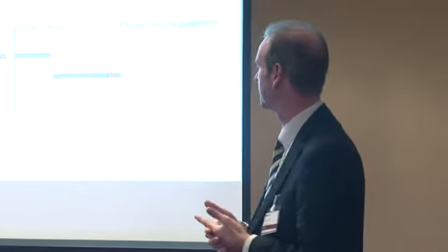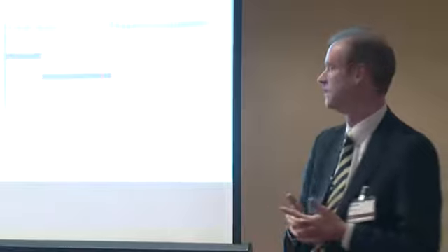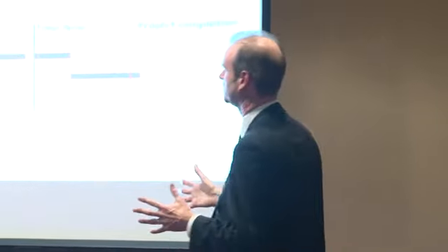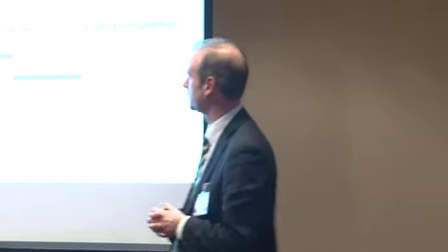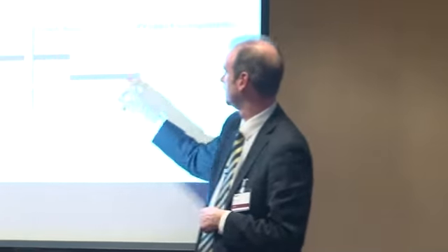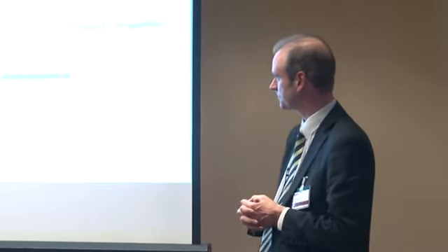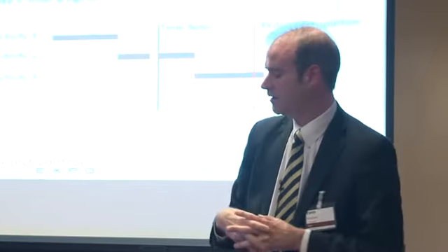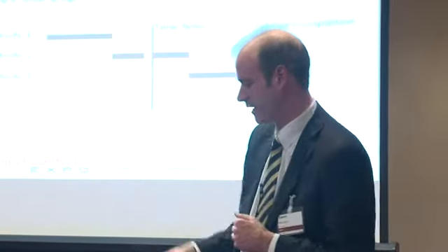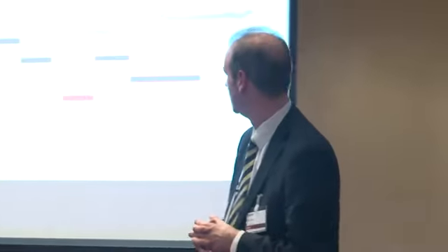The second activity, there's been a little bit of a delay. That might be the responsibility of the contractor who just hasn't progressed his works as he originally planned. And we can see when we schedule out the remaining works that it's caused a delay to project completion. But at time now, we are going to now impact the effect of a delay. And when we do that, and we reschedule the outstanding works, we can see that the completion date has moved out even further.